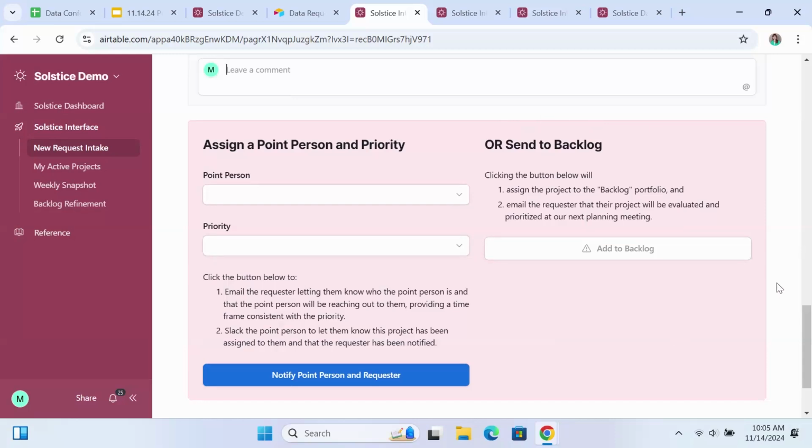Once a month, we have a team meeting where we review our backlog and decide which of those projects need to be brought forward to be worked that month and which can be waiting for later. So that's part of our responsive request management in meeting the needs of our stakeholders, so we can prioritize those projects that are most important right now, but not lose track of the other ones that are not an immediate need.